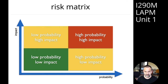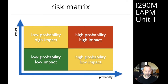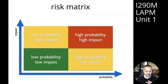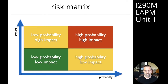Everyone goes and brainstorms for a few minutes on their own, then we stick the notes on the risk matrix in the right quadrant — top left for low probability, high impact risks; bottom right for high probability, low impact risks. Once you've spent a few minutes brainstorming, you can have a discussion as a group to think about which ideas are actually high probability, high impact, and you might move some of them around. Then you can focus on the high probability, high impact risks.